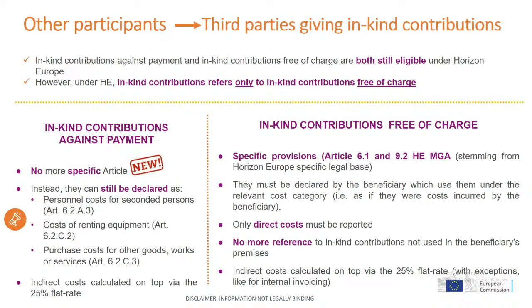So here it is necessary to make a distinction between in-kind contribution provided against payment and free of charge. In-kind contribution against payment refers to the situation where there is a payment, a financial transaction between the beneficiary and the third party for the in-kind contribution provided. In-kind contribution free of charge, on the other hand, refers to the case where a third party makes available some of its resources to a beneficiary for free, meaning without any payment.